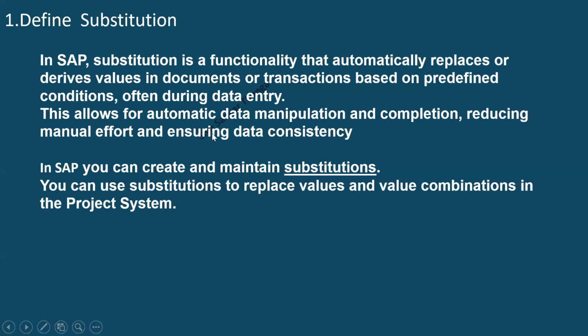That is one example. Let us say I want to enable the billing element at the level 1 WBS. Let us assume that while creating the level 1 WBS element, the user did not enable the billing element. What is the issue if we don't enable the billing element? He won't be able to perform billing with respect to the WBS element, because in the sales cycle, we will be assigning the root WBS at the sales order level. Once the billing element is not available, the billing document will not be created. That is the reason we need to enable the billing element for the WBS element.